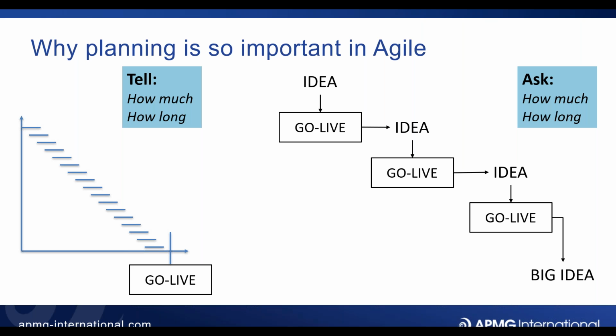And what we're doing is not working out all the activities that we need to do to achieve that. We are doing something completely different, staying at a much higher level and going, okay, but which of those ideas are we going to select first? And then what we're going to do is a mini plan around those.